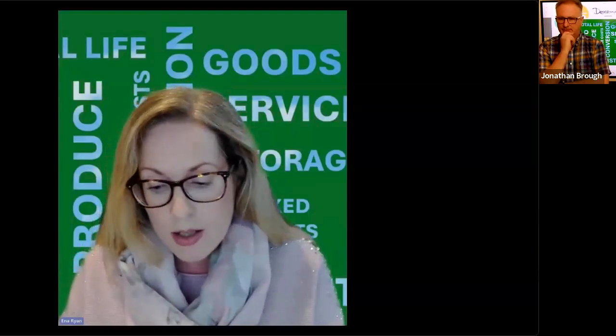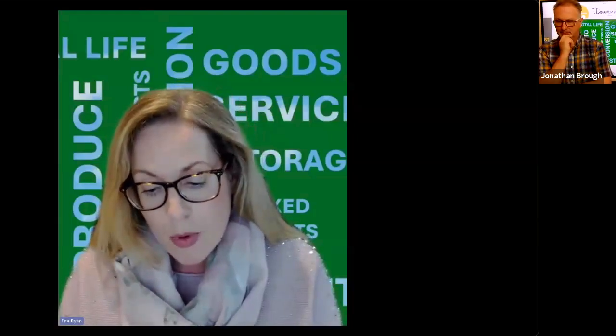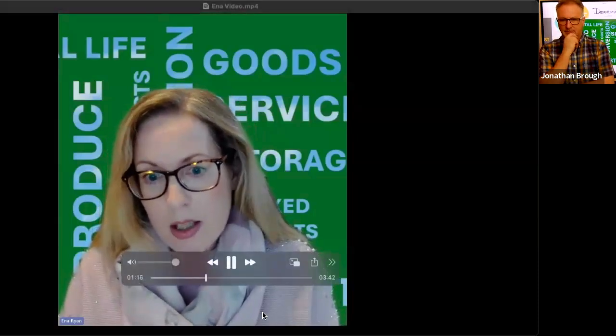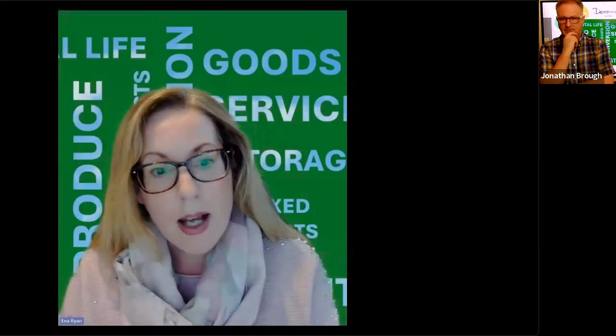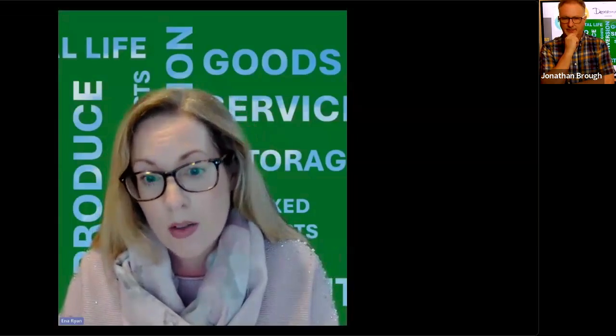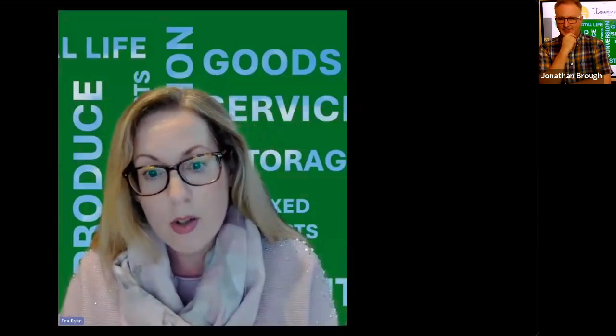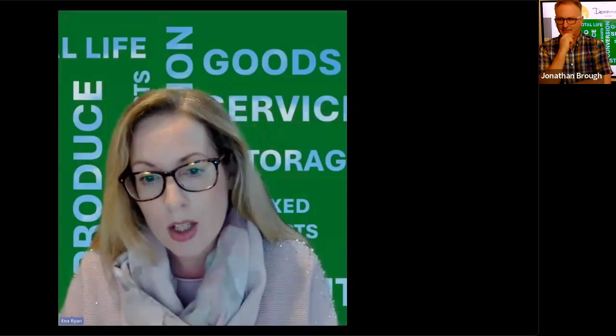Another important selection criteria is obviously quality. If it's a product, we need ISO certification. If it's, we may need REACH or RoHS. Then service level is really, really important. And on service level, what we mean is key account management, day-to-day contact, escalation process, proactivity. And we actually have moved away from suppliers because of the service level. So poor communication, not being proactive. So service level is actually really, really important.